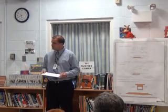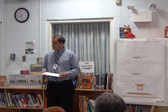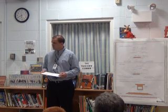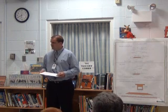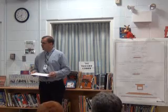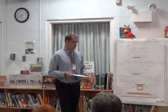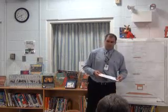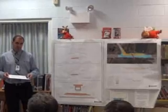We've done block replacements with total road closures in two to three weeks. I can get the old one out and do one in. But in staging it, maybe a little longer, because it's more difficult to juggle the sequence. Yeah, probably 3-4 weeks, I guess. Maybe most of the 4 weeks. So I'm guessing probably overall 2 months for the project completion. And you said something about the signals.